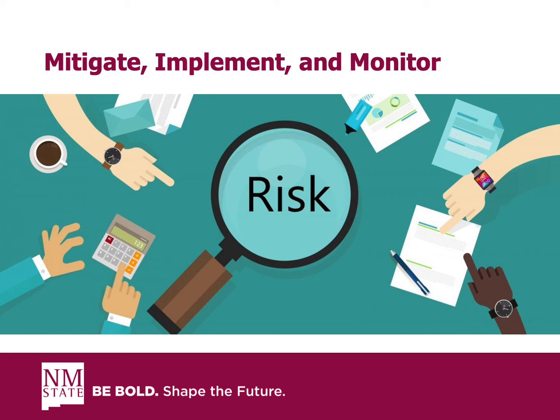If you modify risks, you make changes to modify your event or activity. Think about who can help us, i.e., experts. Here are some other ways to modify risks: security, supervision and training for staff and volunteers, procedures, signage with instructions, admittance and access controls, restricted areas, and warning systems. Transferring risks occurs through the following: insurance as an option, clear instructions, contracts, waiver forms as an educational tool, written contracts with staff and volunteers, third-party vendors.